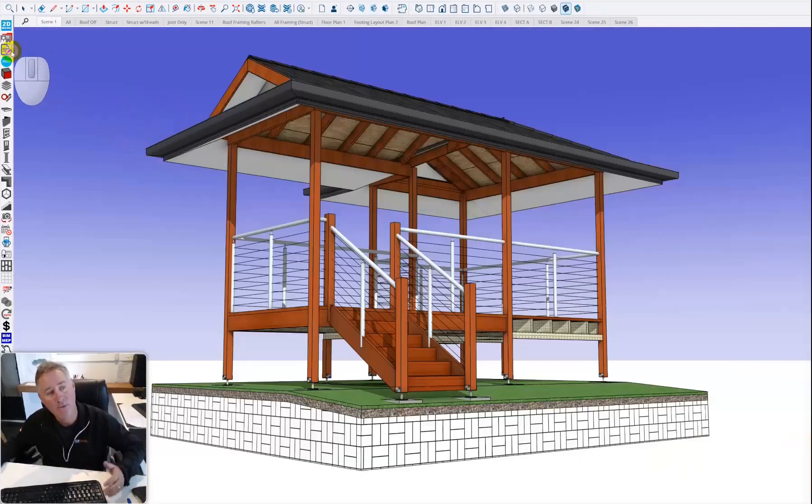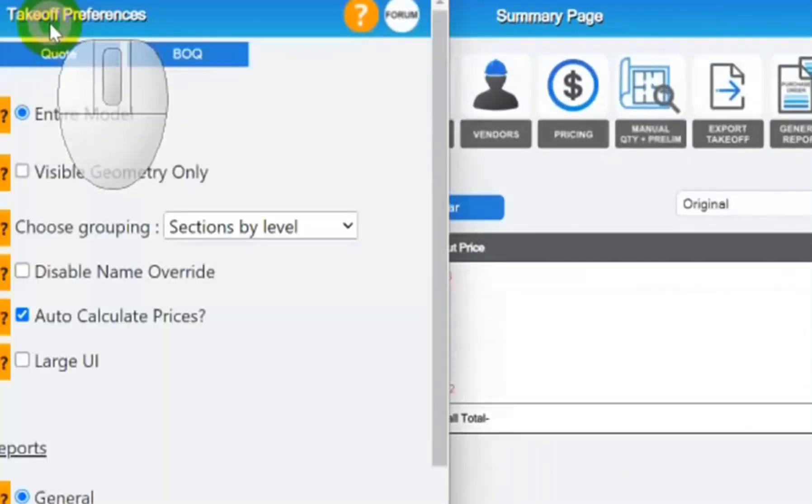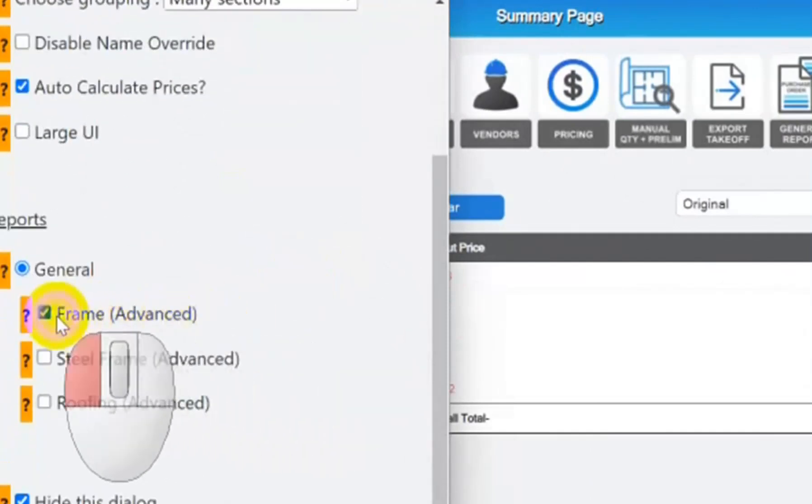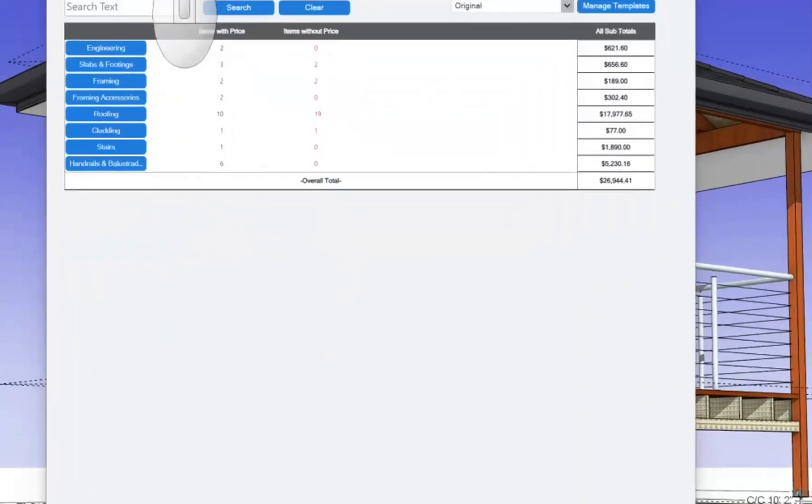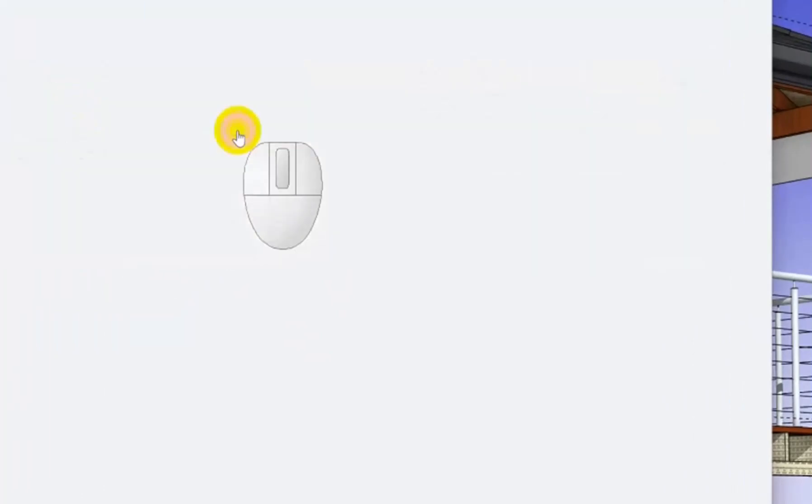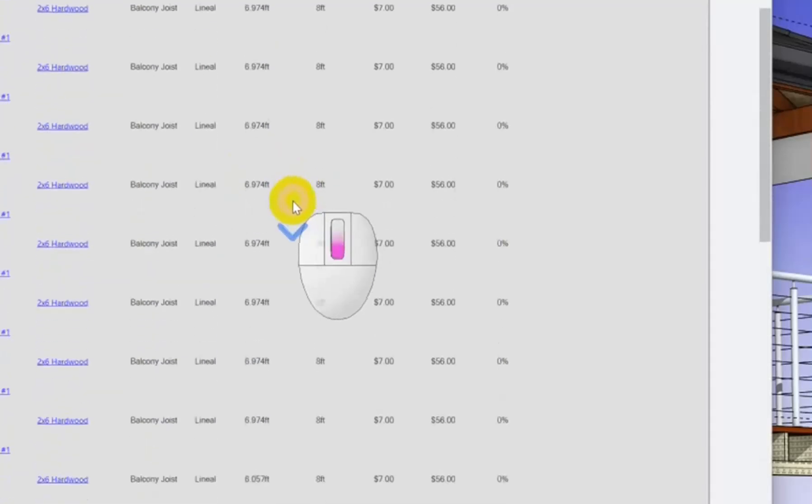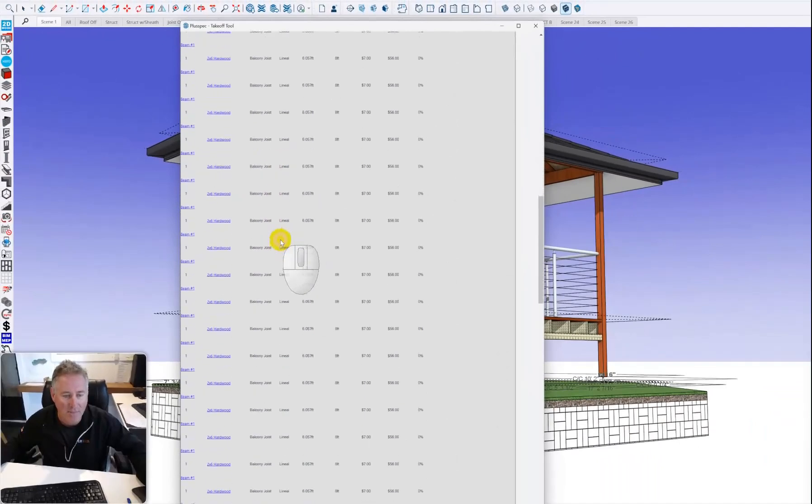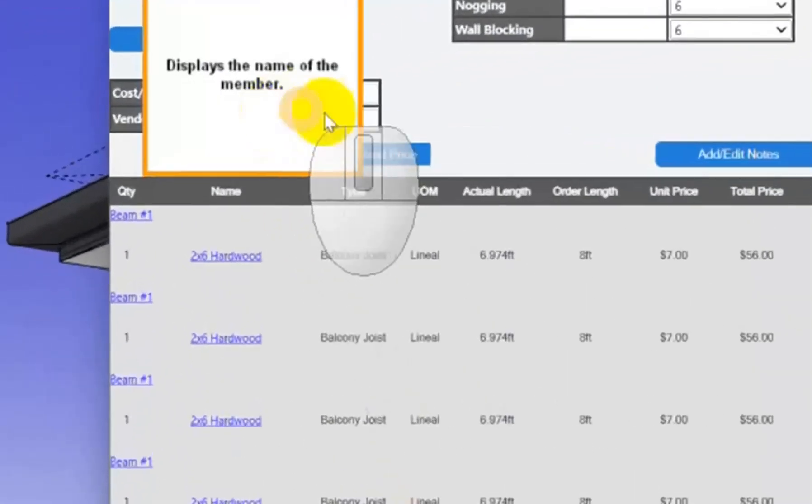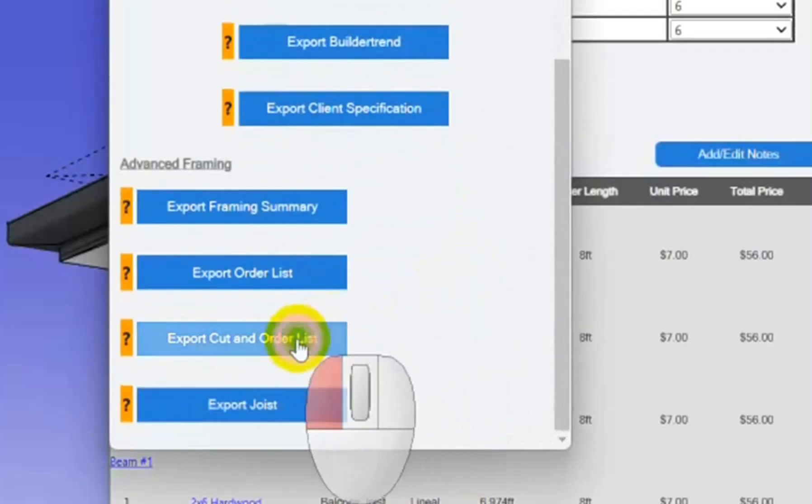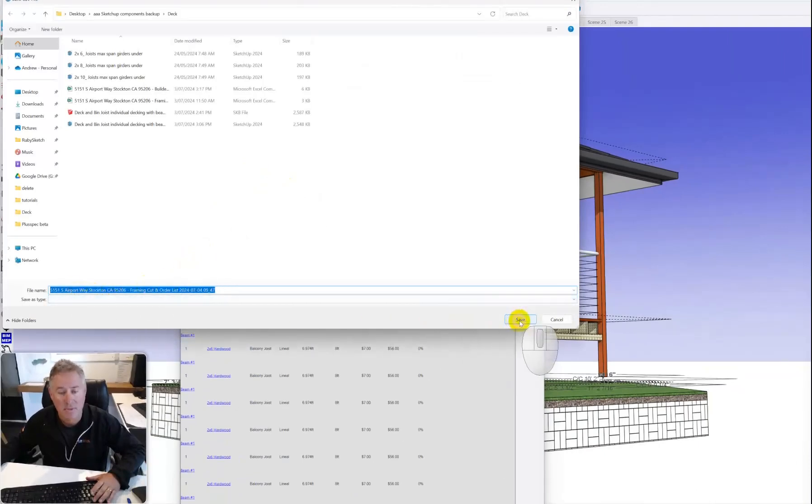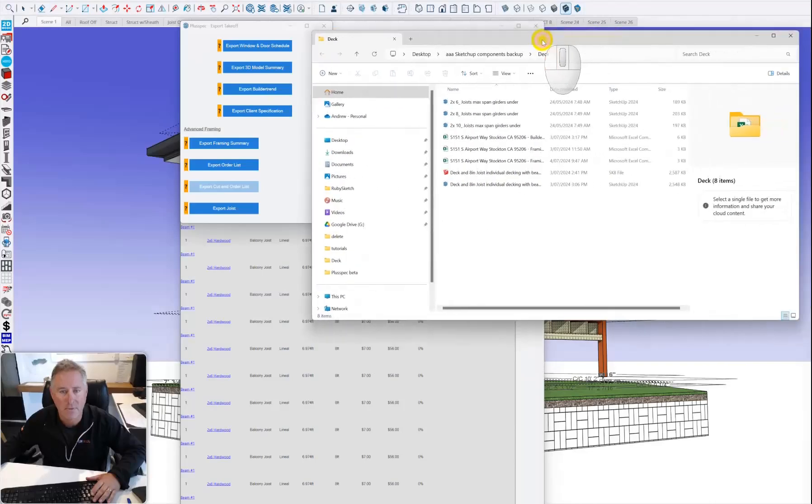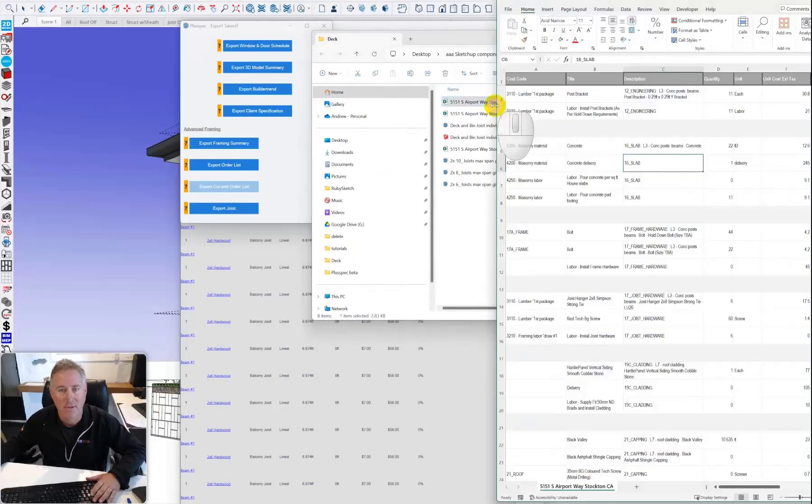Now I mentioned how do we create cut and order lists. Inside our takeoff we can change it to do advanced framing takeoffs and create cut and order lists. If I go to my framing and advanced framing edit, you'll notice it's broken every member down into a beam number and size so we can actually order these things. It's telling us what type of joists they are, whether they're girders, the size they're to be cut, and so on. We can export this to an Excel spreadsheet. I'm going to export takeoff and send it over to a cut and order list.